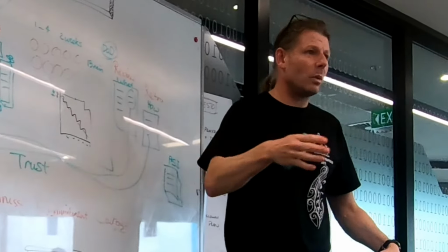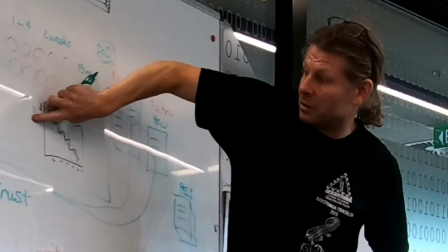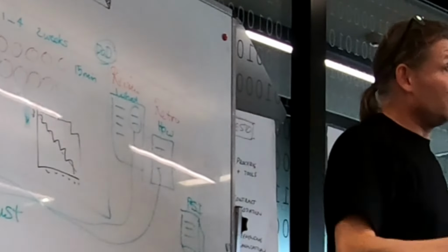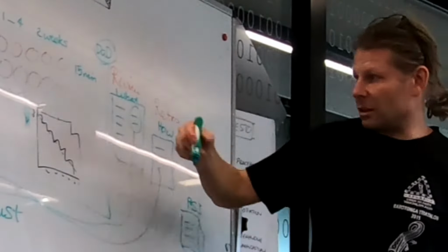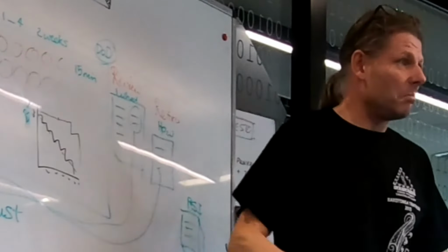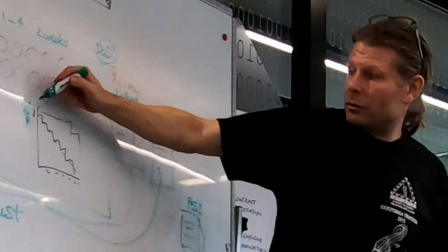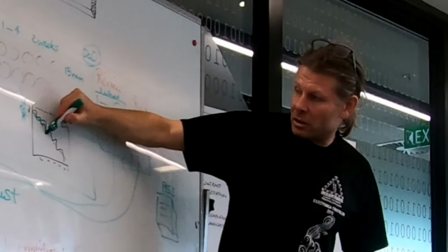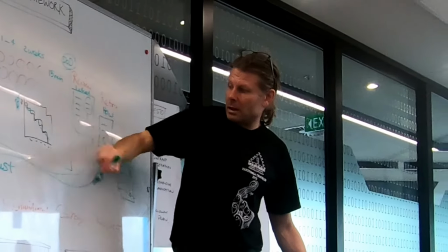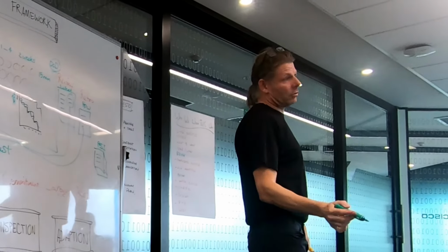So I would, and this is why we don't want a timesheet, and we don't want management seeing this. But what we do want to do is add up all your stories, and you may get to, for a team of 6, probably 250 hours, roughly. And then you have 250 hours, and as you knock off these tasks, you should see the burn down chart do something like that. So at any time, you know how you're tracking.